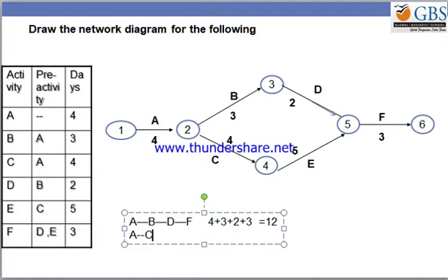A to C, C to E, E to F, which is again, if you calculate, 4 plus 4 plus 5 plus 3, which is equivalent to 16.